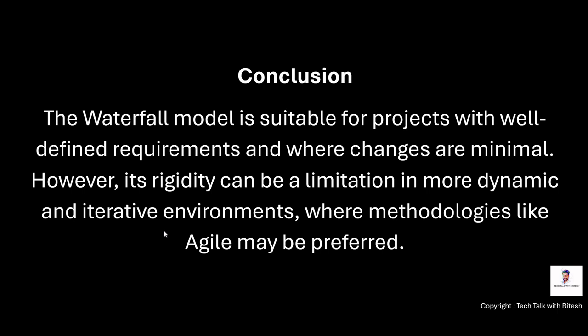Okay, let's see the conclusion. The waterfall model is suitable for projects with well-defined requirements and where changes are minimal. However, its rigidity can be a limitation in more dynamic and iterative environments where methodologies like Agile may be preferred. Right? So if the project is well-defined, it's a small project, minimal changes are required, then we can consider the waterfall model.